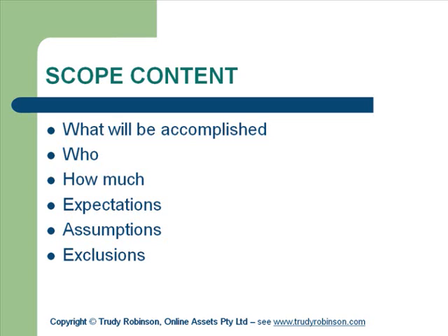In a business-based project, it is really important. It's one of the most important things you can include because if you don't, then people will assume that anything they think is included within it is fair game. And what the exclusions help you do is manage your contract variations. Remember we talked about out-of-scope items and change requests, corrective actions, etc. Your exclusions actually help you manage those things. You say, okay, I clearly told you that we were not going to develop a website that would include customers organising their own accommodation. So that's the sort of thing you actually have.